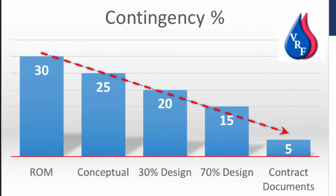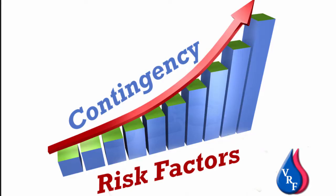You could also call it an allowance. In the early stages of development, when assembling a budget, this number will be at its highest because the project has not been fully developed to a point where you can itemize components for a detailed cost analysis. There are costs that can't be identified until more detail is added during the design phase, which warrants a higher contingency value starting at the conceptual stages and then reducing it as the design becomes more complete and you get final construction plans.